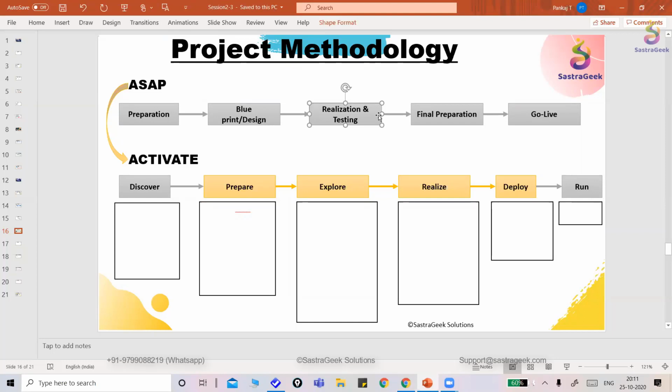And in that phase, actually, we start involving the business to show them how SAP is working. And we used to get the user acceptance test sign-off from that. That is what we are mapping: that is your current process, and that is how the future process will happen. That scenario gets signed off by the user, and we move it to the next phase, that is final preparation. Final preparation also includes any bug fixing. Again, we used to have some kind of testing in one environment with some realistic data, and then we used to upload the data into the system for the go live.